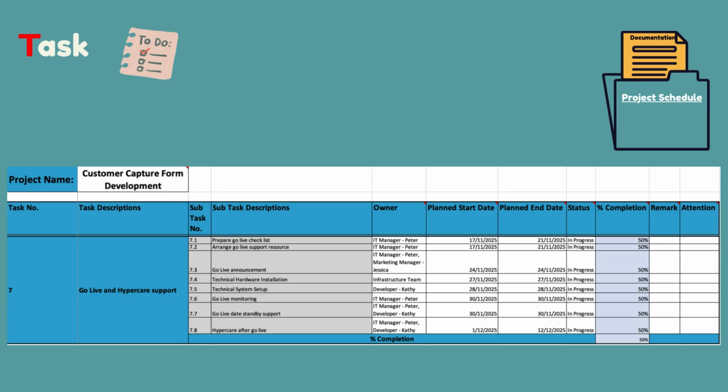Put the necessary steps in action before the go live date, including hardware installation and software or system setup. From a few days before go live or on the go live date, closely monitor and make sure nothing is missed or went wrong. On the go live date or one day after go live, stand by in case anything happens and needs urgent investigation or escalation.